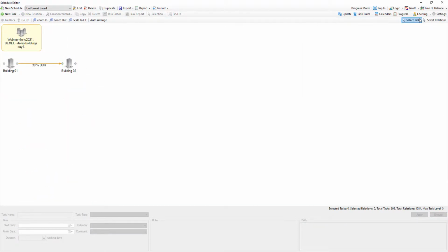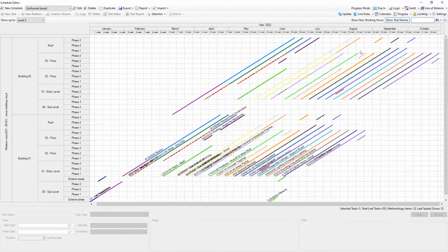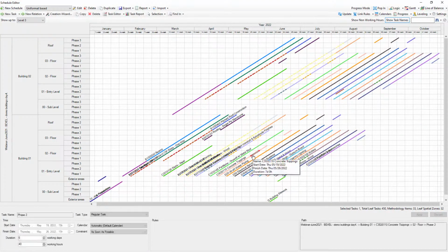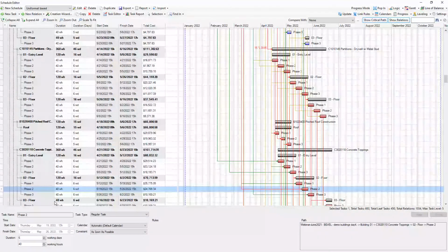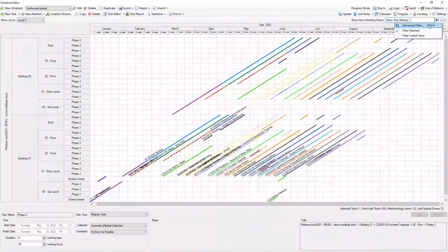between main work items. And line of balance view is very important for location-based planning. Here you can analyze tasks through levels and zones and make adjustments. One of the greatest benefits, since entire schedule is generated using BIM, is that everything is connected and in a way interactive. We can find selected tasks in Gantt chart.